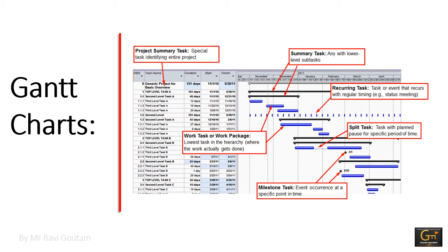The work breakdown structure begins with a single overall task representing the totality of work to be performed on the project. So this becomes the name of the project plan work breakdown structure. Using a methodology or system life cycle including analysis, design and implementation steps as a guide, the project is divided into its major steps. The first phase is project initiation, the second major phase is analysis, followed by design, construction, testing, implementation, and the post implementation follow up.